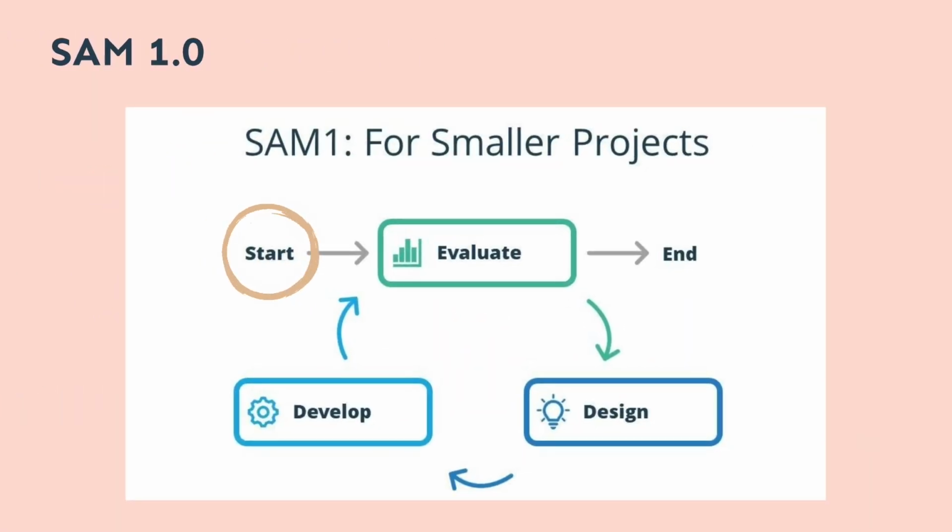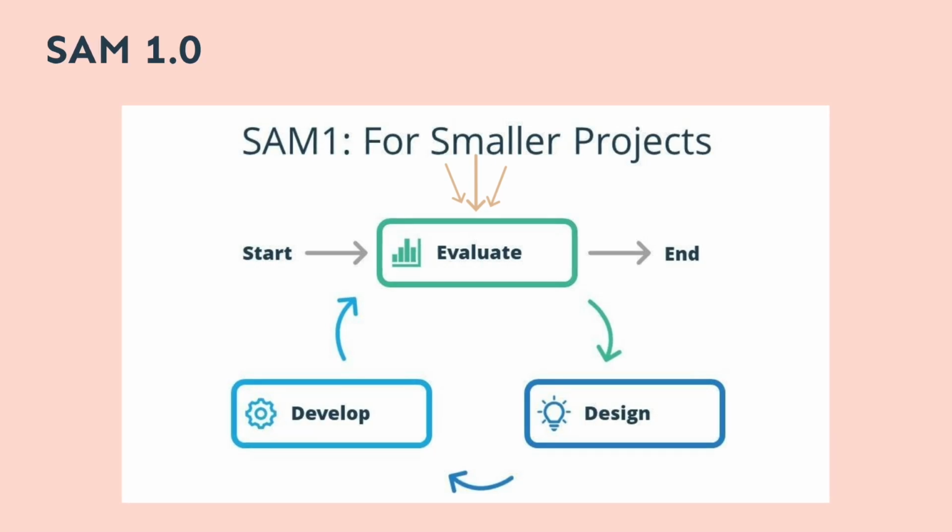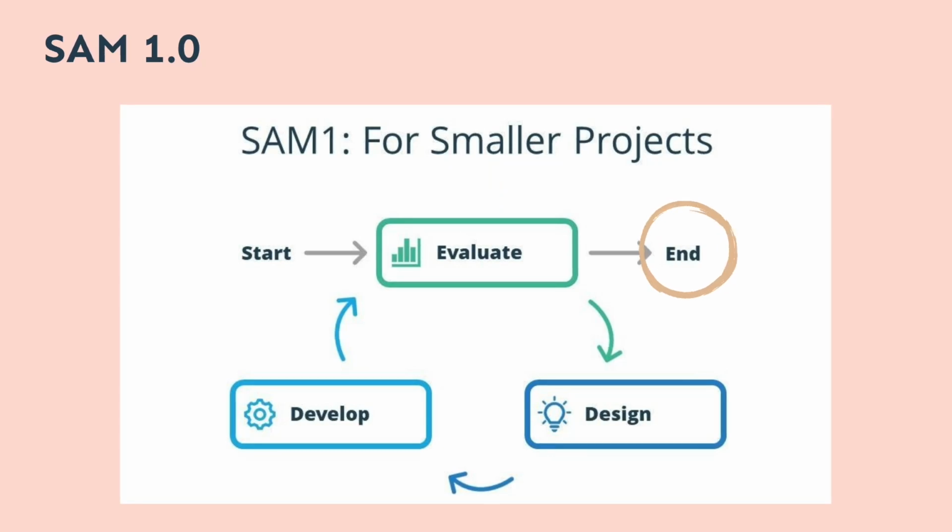To start, designers identify project goals, learning outcomes, and constraints. Gather initial information and define the scope and direction. During the design and prototype sprint, designers create design drafts and prototypes quickly, conduct reviews with stakeholders to refine ideas and identify issues, build functional versions of the instructional product, test with users, collecting feedback and refining as needed, repeating this cycle multiple times to finalize the product through successive improvements.